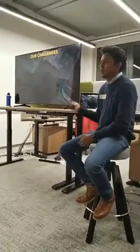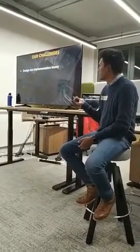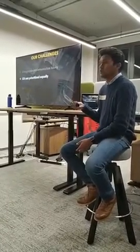I want to highlight some of the challenges we had in our product. Design was always implementation heavy because the developers were not really informed about the UI decisions that the designers would make. They were not part of the user research activities or the ideation sessions that the designers were doing at the time. So during sprint planning and refinements, there was a big surprise when they tried to estimate the user stories. When they had these high-end designs, they found it difficult to estimate, because some of it was technologically not possible, and it would have helped if the developers had been involved earlier.